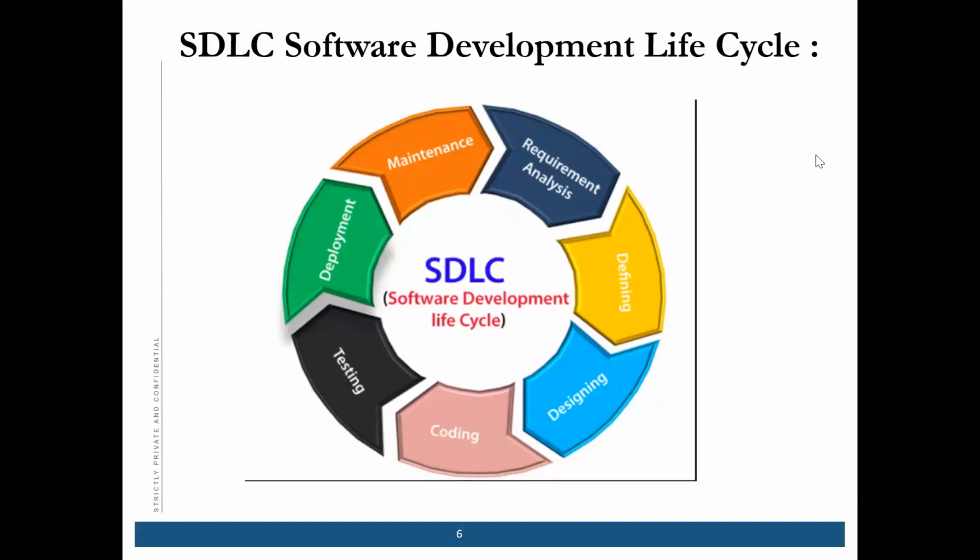they put a freeze on development, which means no more regular cycle, no testing, no deployments, right? Only patchworks. They just hand it off. So whatever version is left off, they'll say, okay, our contract with you is over. You can hand it off to the maintenance team. So we hand off the code, the procedure, the documentation, everything to the production team. Usually they are in-house people. You're a contractor, right?